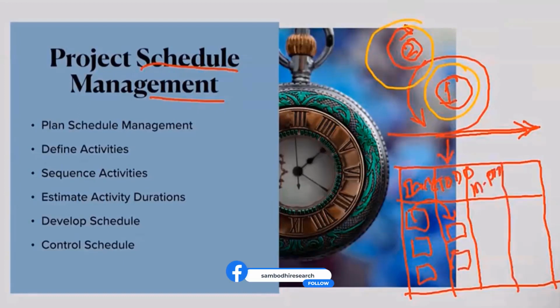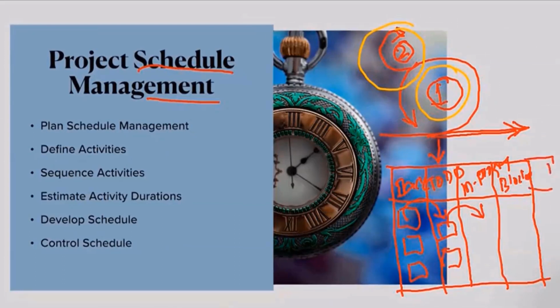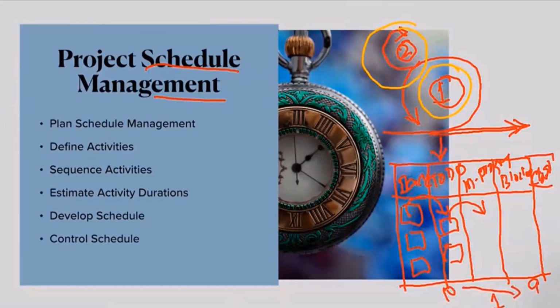So in to do, it is just those decided tasks, but if they are actually started, they will be in progress, right? So out of the list of 10 tasks that we have identified as to do, whatever tasks have been started by the team, they will move to in progress. So there could be one more column that is called blocked, or testing, or under progress. You can add all those columns, and finally the last column will be closed, right? So at the end of the sprint, how many tasks are to do? Let's say, for example, 10, and at the end of the sprint, we have 9 tasks closed. So the remaining one task, what will happen? It will either go to backlog, or it will be taken into the next sprint, right?